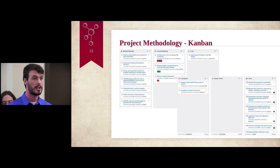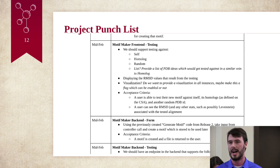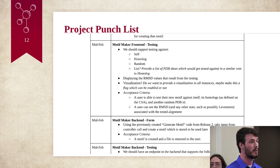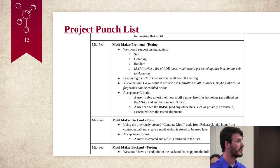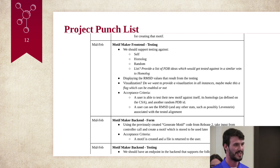the semester. Towards the second half of the semester, we ended up making, at our sponsor's request, a project punch list. So this is a rather long document detailing all of the development tasks that we have remaining for the rest of the year, so that we can use our t-shirt size estimations that we've done so far with the development tasks that we have associated with them and the time that it took to accomplish those various t-shirt sized tasks. So we can make sure that the planned releases and the up-to-date versions that we are going to have in the spring, that those release dates and schedules are appropriate so that we're making sure that we're finishing our project with enough time to be able to present at the end of the year and say that we finished.